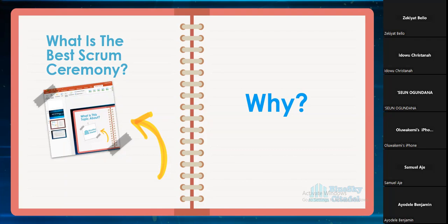The customer tells you, you do the foundation, you show the partitioning, you bring the customer in, come and see, we've done the foundation, we've put it here, put it here. The person says, no, that particular room, I want the edge to curve at the back. You see, it's only the foundation we've done. What will it take us to adapt to just curving that end? We won't be wasting any money as such. We'll just adapt immediately, make the changes the person wants there, then we start building it up to lintel.